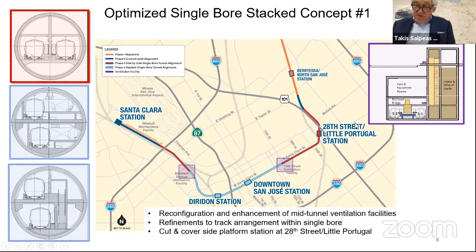In our language, we call that construction a deep retained cut. It will take us very close in proximity to 101, but at the ground, under 101. Then from that point on, we're gonna take the 48-footer tunnel.